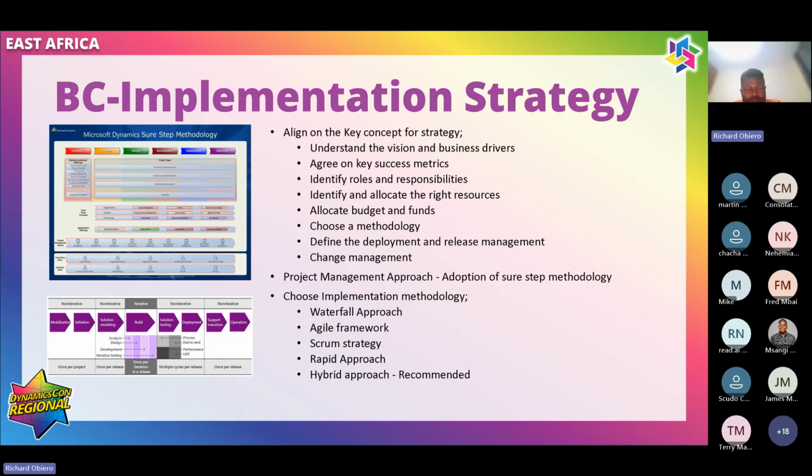Because when you identify these individuals early, you will get the right process from the beginning. You may sit with the head of engineering, he may give you a particular process, and that process was decommissioned about 2 years ago. They are on to something else. Because process drivers in a manufacturing organization are sectionalized, they are tunneled, they're working on specific tasks.